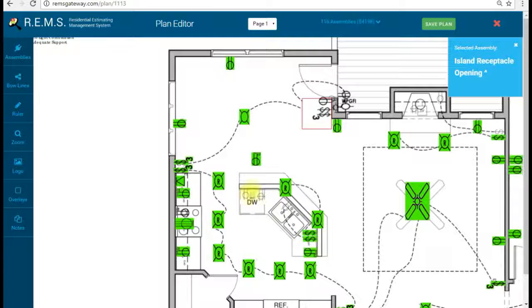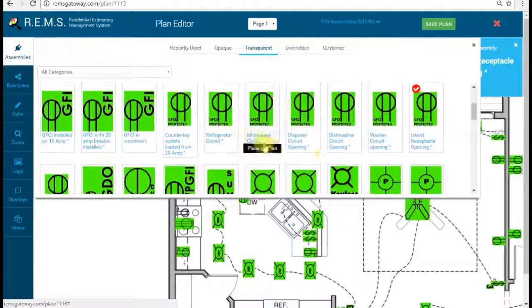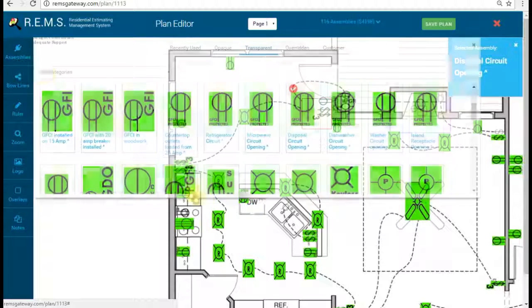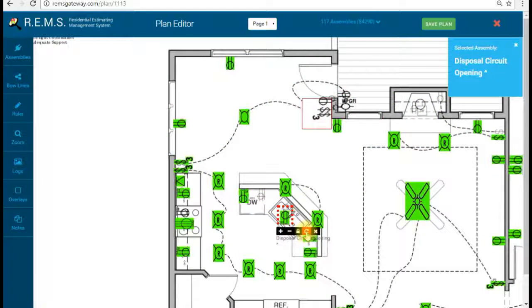They're just showing you the outlet. You as the estimator need to make sure that you're showing the right icon that's going to be the type of material you're going to be using and the type of price that you want for something like that. And they're never going to see these icons either. So they don't know what you did, but you'll know as the estimator so that it'll correct it for your materials in your estimate.